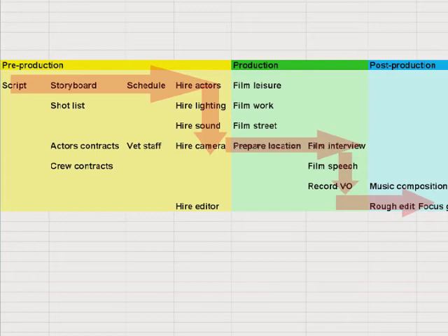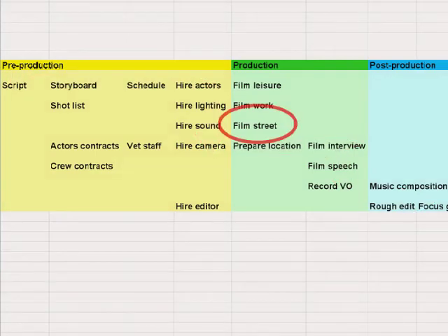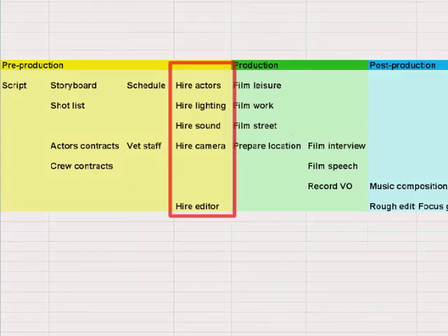Secondly, determine the shortest time in which the project could be delivered. Thirdly, to identify tasks representing risks. The project manager knows this critical path requires his or her main focus to ensure everything goes smoothly. And fourthly, to identify periods when too much may be happening.